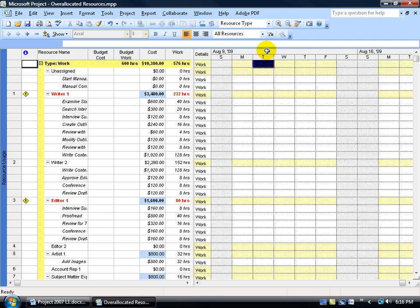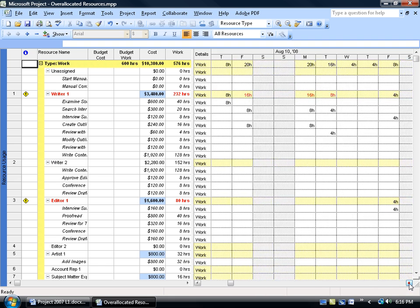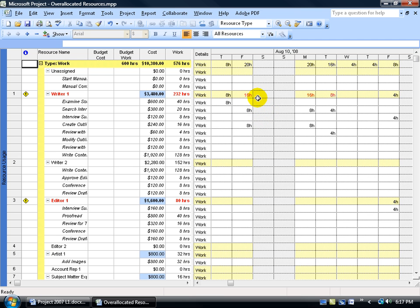The timeline is showing 2009, but my project was done in 2008, so I need to go back. I'll drag the slider all the way back to 2008. To find the over-allocated days, I scroll right until I see red. For example, the writer has a summary of 16 hours broken across two tasks: Search Internal Documentation and Create an Outline. He's working on the same task for two days — Friday and Monday — and then a different task on Tuesday of the following week. If he's working at 100%, that's 8 hours, and he can only work on one task. The other task will have to move out, because 16 hours is over the 8-hour day.